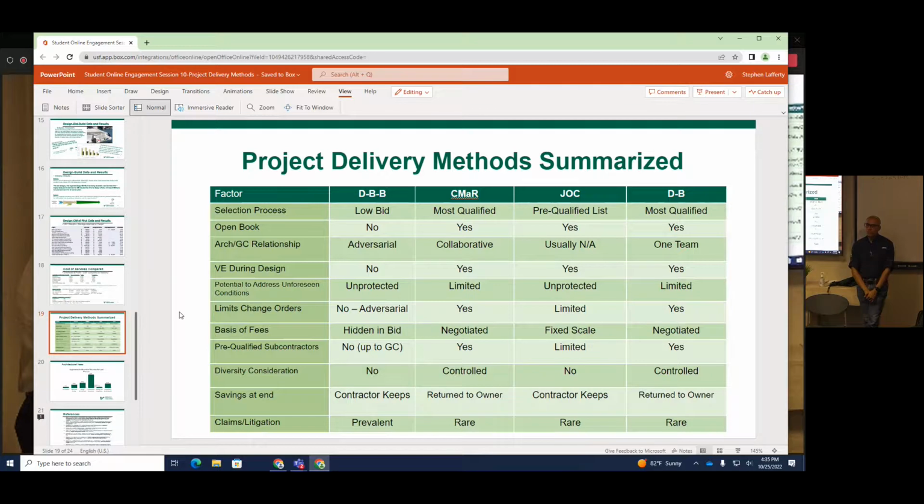They wanted to save some money. So they built Newsom High School in Riverview. And then they decided, hey, it's such a great design, and to save some money, let's build the same exact high school over in Ruskin, and that became John I. Leonard High School. If you walk through both campuses, the only difference is really the colors. It was the school district's way of saving money so they could use the extra funds elsewhere, and they competitively bid that. So that's an example of where that delivery method would be effective.